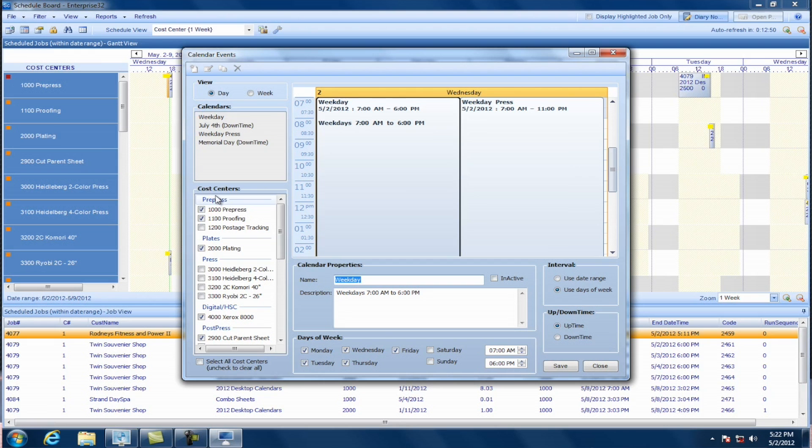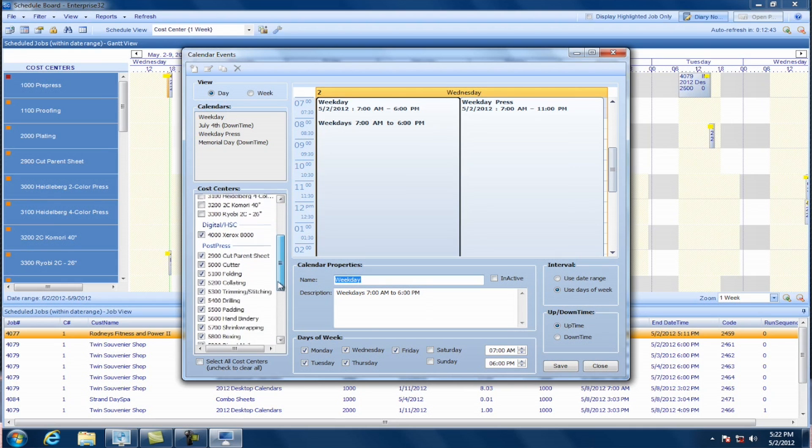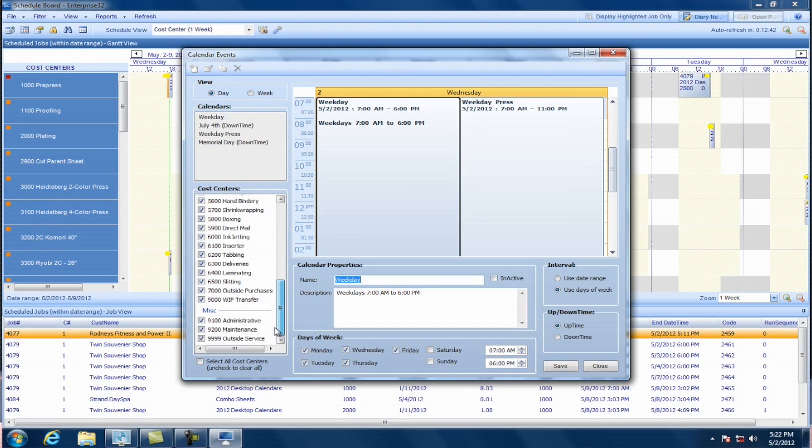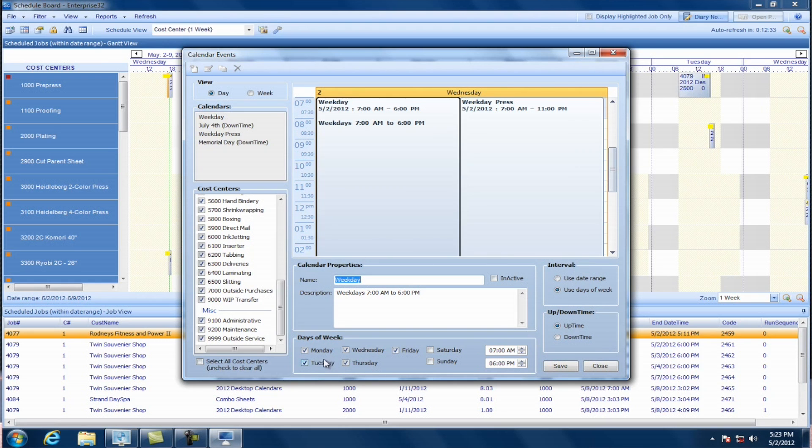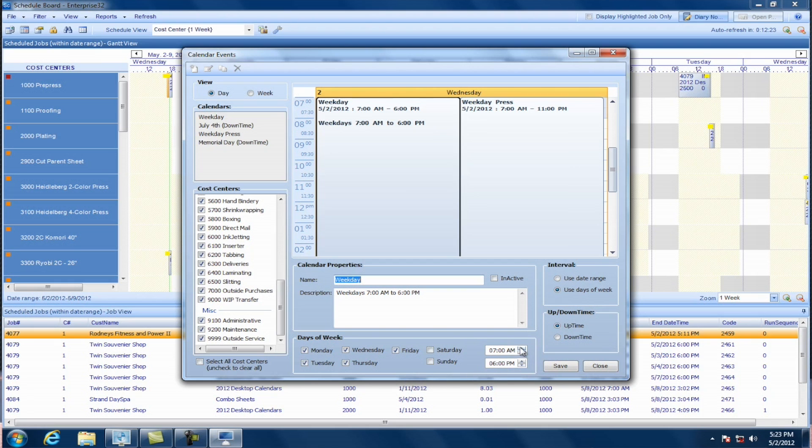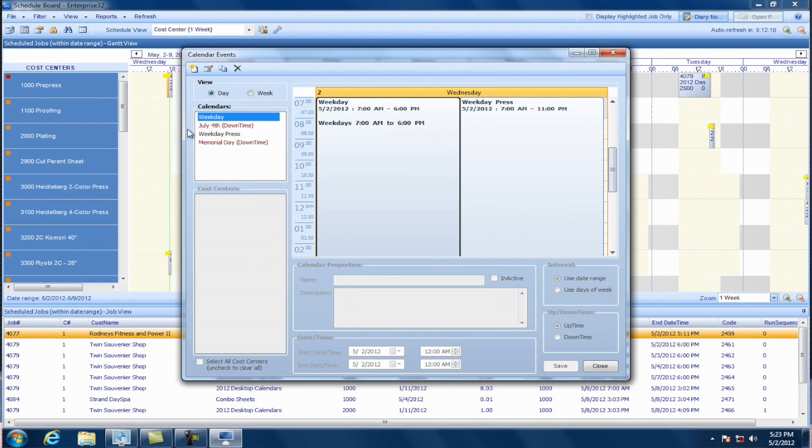In this calendar, on the left-hand side here, I've told Enterprise what cost centers I want to include in this calendar. So you can see I've checked them. If you want all of them in a particular calendar, you can just click down here and select them all. And then on the right here, I have a few options. I can tell it whether I want to use a date range for this calendar or particular days of the week, which is what I'm doing here. And I've told it that this calendar is for Monday through Friday from 7 to 6. All right. I'm going to close that calendar.